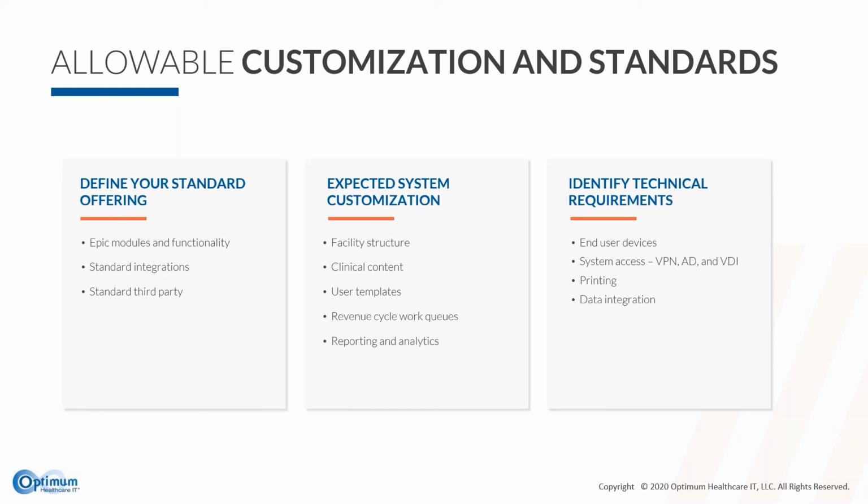Then there's other areas, work queues, your go live critical report portfolio. It'll get a little more complex if you haven't already been through this exercise to really say, okay, what is our standard customizable group of work here? It's build that you may need to customize, but you'll be doing so based on standard templates and standard defined scope. It's not something that you're starting from scratch and saying, hey, what do you need? Because that's where you'll get in trouble with all kinds of non-standard build that's then very difficult to support.